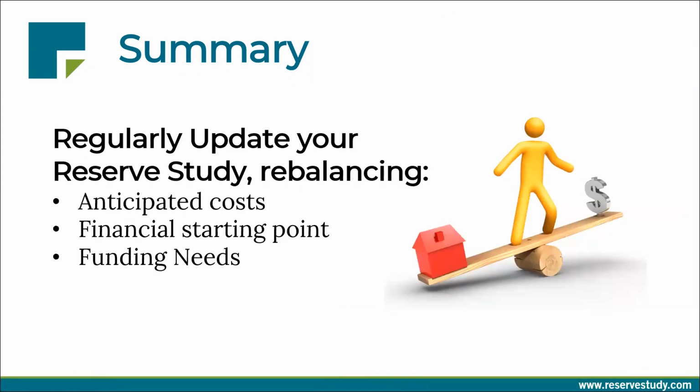So expect to regularly update your reserve study, rebalancing the anticipated costs. That's what we're talking about today. When are they going to happen? How big are they going to be? Updating your financial starting point, which is the latest reserve balance, and that all gets computed into your reserve funding needs. But the point of this webinar is it all starts with the anticipated costs, and those are changing every year, when and how big they are.